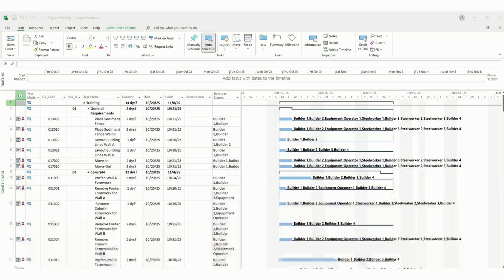What drawing number sets are you on? When is the planning actually completed? Specification numbers and dates. Were there permits required? Who the different points of contact are. The management plan, organization responsibilities, and then break down your plans, because they already are broken down into civil, site work, architectural, structural, mechanical, and electrical. Put what those scopes are in each one of these sections, so we know, or you guys know, what your description of work is for each one of these sections.